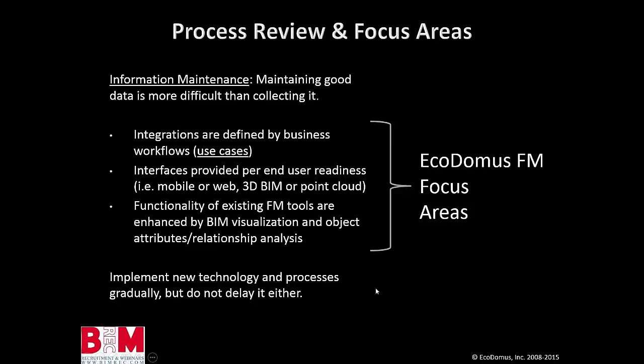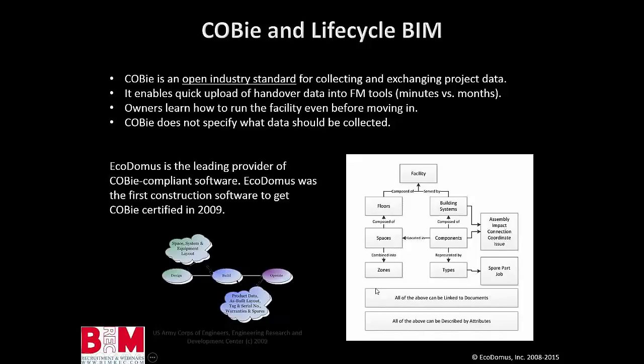About COBie itself, just for those of you who have heard of it for the first time recently, it's an open industry standard for collecting and exchanging project data. The most popular use case for COBie is the upload of handover data into FM tools. The benefit of it is that since the data is being collected throughout the project, not in the last month, as you collect the data, you are understanding how this facility is going to be operated. So it's a continuous, lean data collection versus an ad hoc crawl to collect the data.